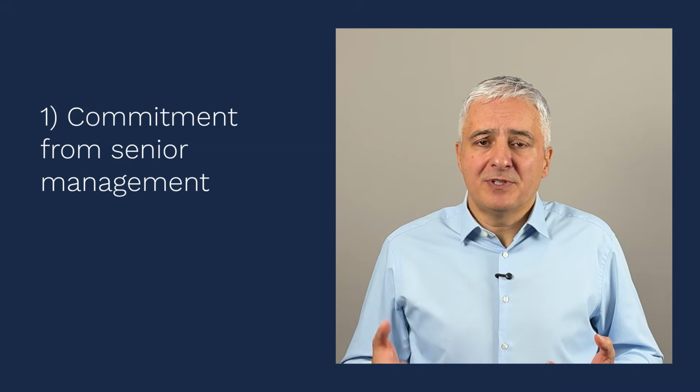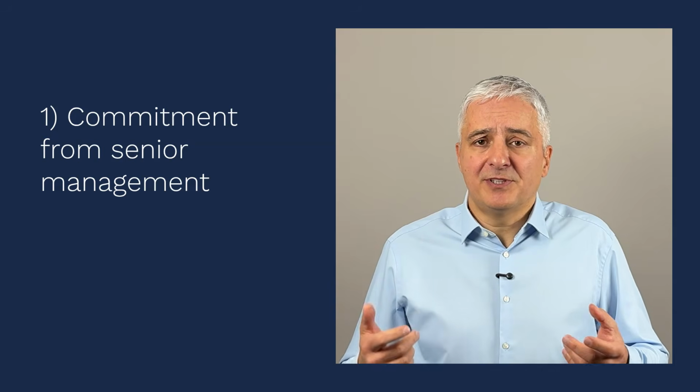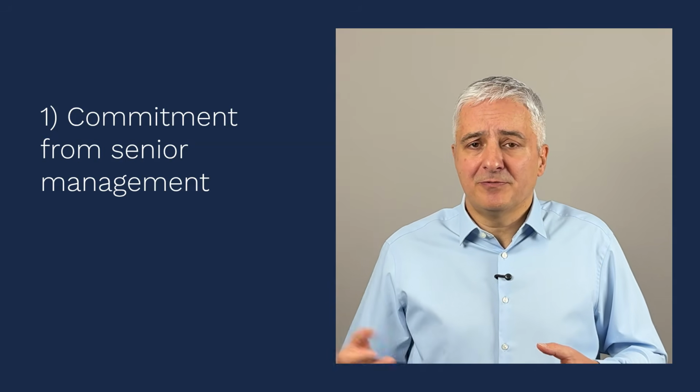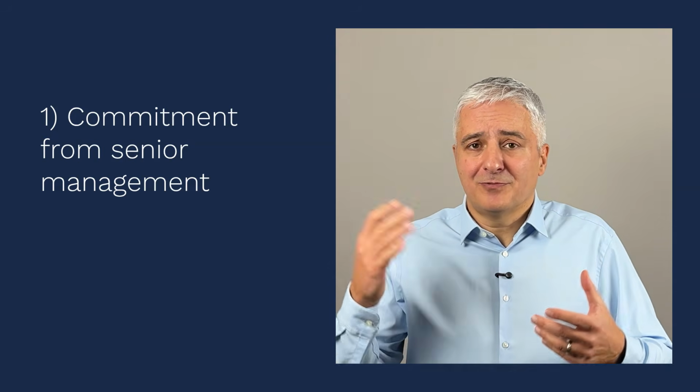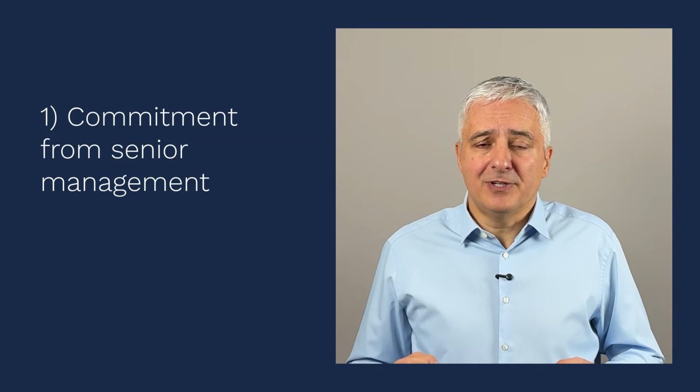Now, why is this important at the very beginning of your project? Because if you don't get the resources from the senior management, meaning enough people, enough money, enough commitment, not only from them but also from the middle-level management, then your project is probably going to fail. So this is something that you have to get from the very beginning.